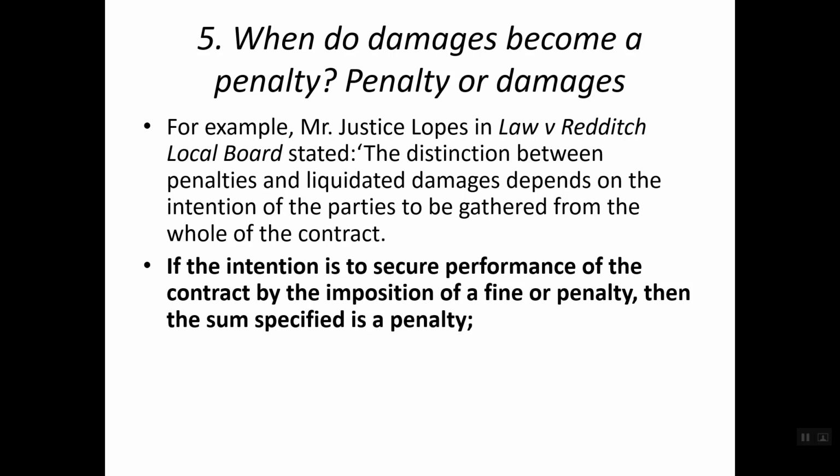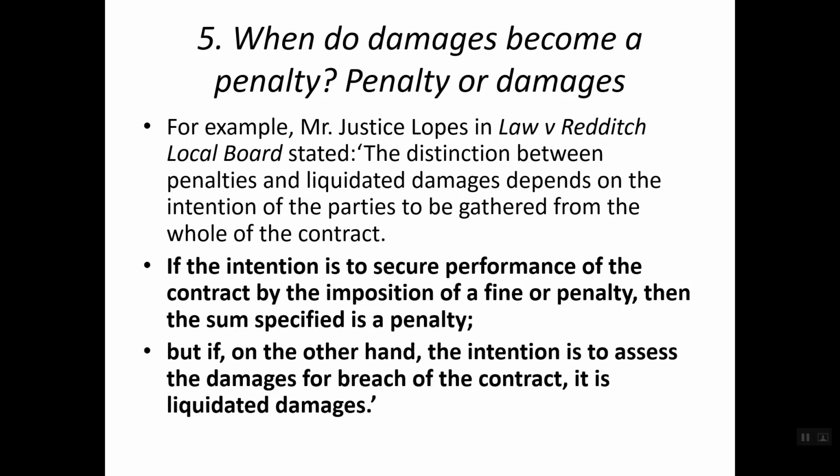The other thing is, when it comes to damages, you cannot earn profit through liquidated damages. Liquidated damage is not a clause for the employer to earn profit. If you do not suffer any loss because of the delay, there will be no additional cost or loss for you as an employer, so how can you charge delay damages when there is no damage? Employers cannot make profit or get rich because of the contractor's money. That is an important point.